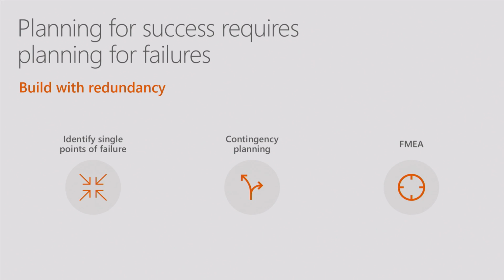But I also want to know that if that does happen, the show goes on. So we spend a ton of time thinking about how things fail, pulling cables on things to see how they work and how they fail over, and really understanding that. Anyone who is a project manager of any kind probably knows about FMEA, failure mode and effects analysis, and that really ties back in. It's about thinking through, hey, what are we going to do in these cases? How is this going to work? How are things going to fail? And trying to test and simulate all those failures to build that planning.